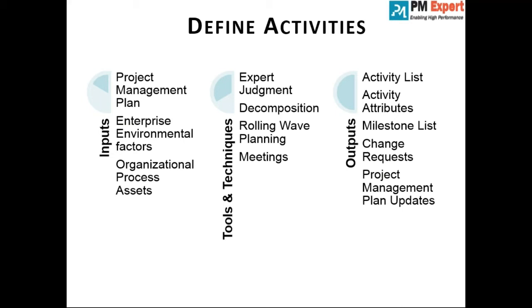Now, planning horizon is what should I do in the next 4 weeks? You are very clear about what you have to accomplish in the next 4 weeks. You know all the detailed activities to be done. It is the distance from the starting point that you can see very clearly. Let's say I have clear visibility on each and every activity to be done for the next 3 weeks. So the next 3 weeks are my planning horizon, and it should be planned in a very detailed and refined manner. For the rest of the time frame you can have a high level plan. If I reach the end of the first planning horizon, I will have a good amount of clarity on what to do in the next planning horizon.